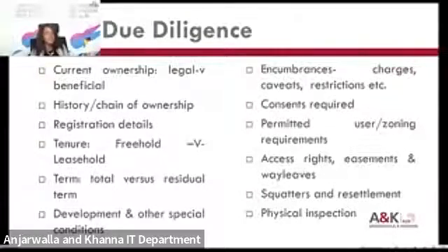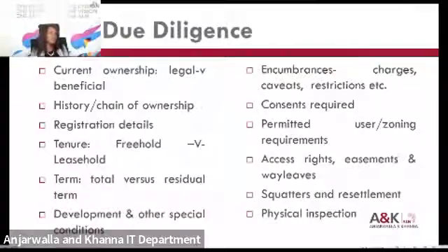And depending on the term of the lease and the nature of the intention of the parties, a lease can actually confer ownership rights because under our land laws, a lease over 21 years with the intention to confer ownership allows the lessee to have exclusive possession of the land and to have some sort of ownership provisions over that land for the tenure of that land.